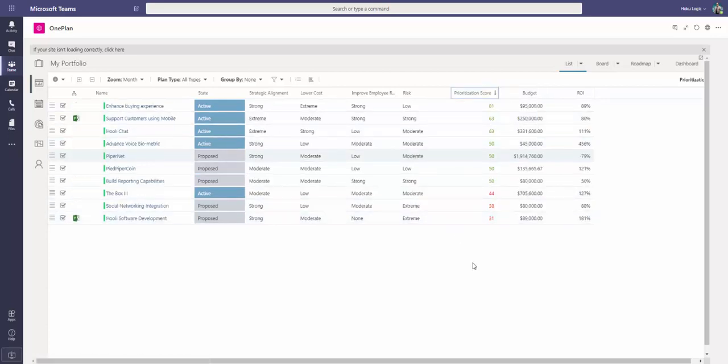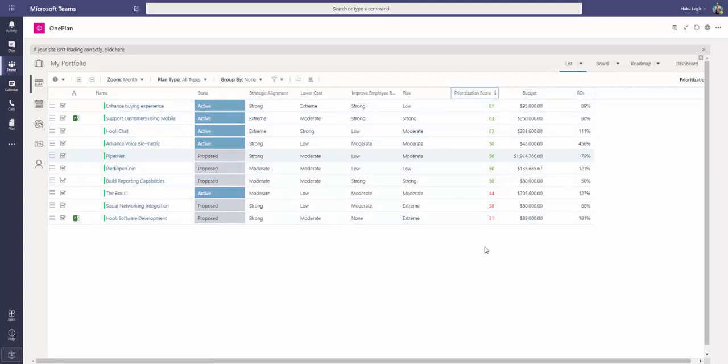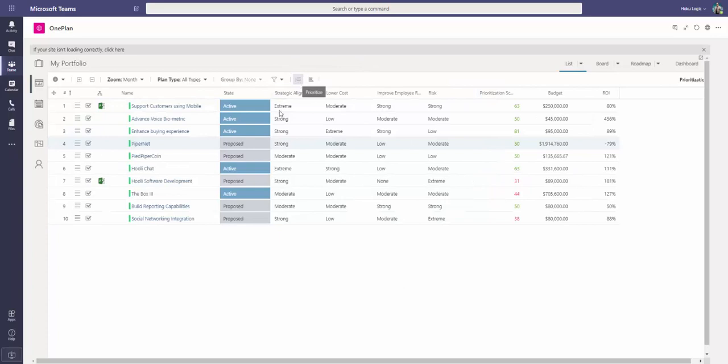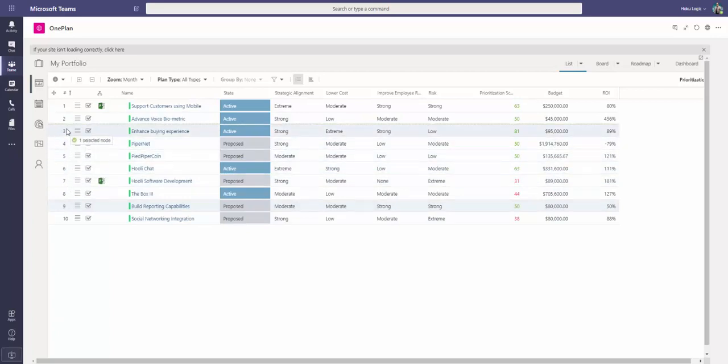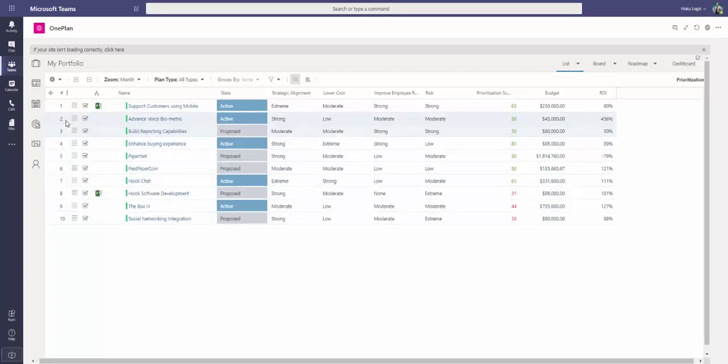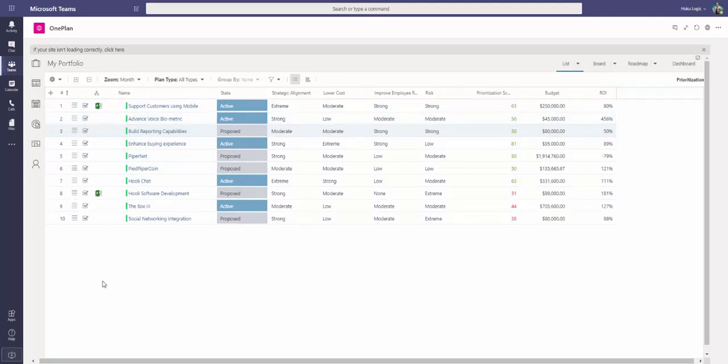And then I can actually sort this based upon those prioritization scores from top to bottom to see which ones I should be doing first. If I want to layer on more manual intervention where I force rank some things independent of those scores, and you can have multiple scoring mechanisms in here at the same time, I can go into a full prioritization mode where I can take this and I can take lower priority projects, for example, and put them up more in their proper ranking based upon the score and actually layer in preference and other priorities we have at the executive level or for whatever other purposes, regulatory or others.